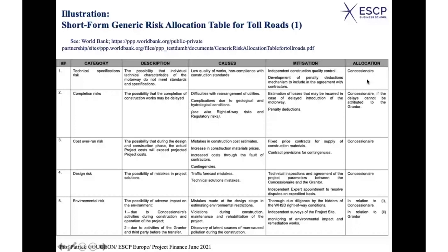So completion risk, let's go for the next one. The possibility that the completion of construction works may be delayed. Difficulties with rearrangement of utilities, complication due to geological and hydrological conditions. When you start such an infrastructure, you never know exactly what you're going to find in the ground. See also right-of-way risk and regulatory risk, okay? So you see, for all these reasons, you may have a delay.